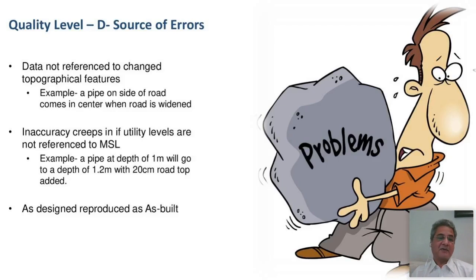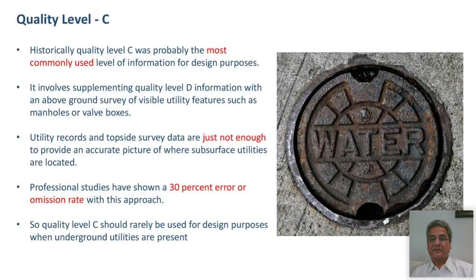And again, the last point is as-designed reproduced as as-built. Most people know that as-designed drawings are generally reproduced as as-built, because if as-built is actually produced, contractors might have serious issues getting their payments. So this is a problem.